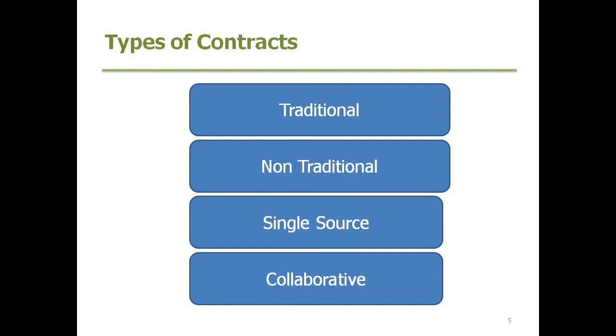There's variations on the client with the construction manager as an agent. Client contracts with all consultants and a builder, and a project manager can coordinate. The client contracts the builder, who takes control basically of the whole process. There's single source contracts, or otherwise considered as turnkey. These are very similar to design and construct or D&C, except the builder also procures the site.